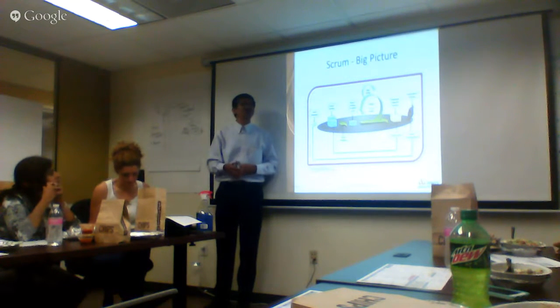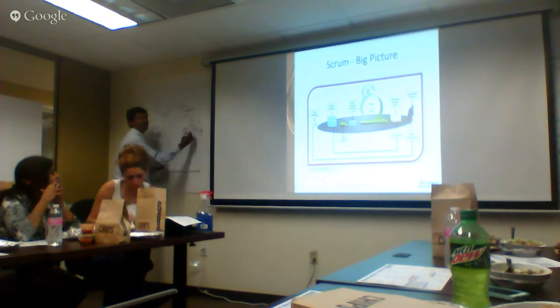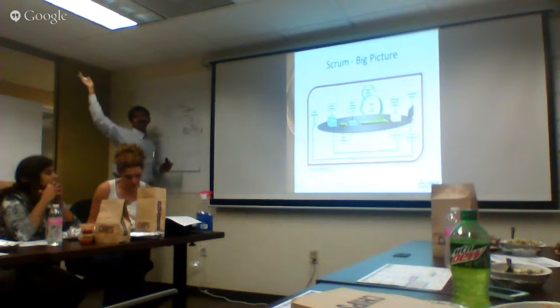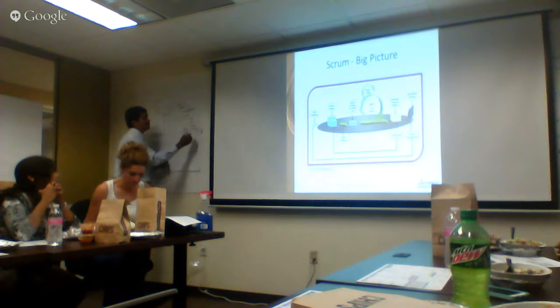Usually in a waterfall project, we do lessons learned at the end of the project, right? And the fruits of it go to another project, not the current project. Here, from day one, you're doing inspection and adaptation, for the sake of the sprint, nothing else.